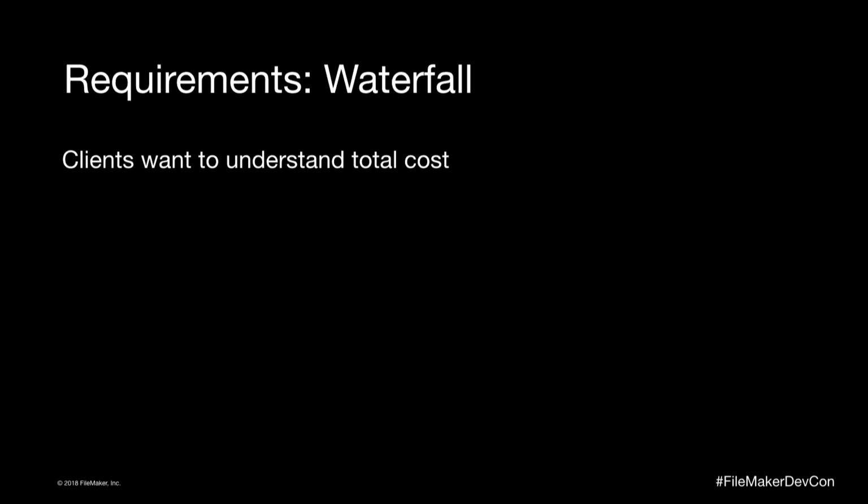Your requirements have to be waterfall for a couple of reasons. Usually, the client that you're working with wants to understand the total cost, and they want to understand the full timeline. If they need to understand to that level of detail, you're already forced into a waterfall environment, and you have to deliver that. Instead of fighting it and wanting to be agile, let's just give them what they want and make the best relationship with your client and give them the total cost and the total timeline.